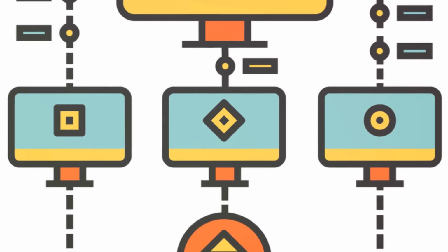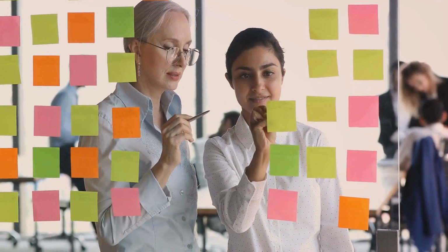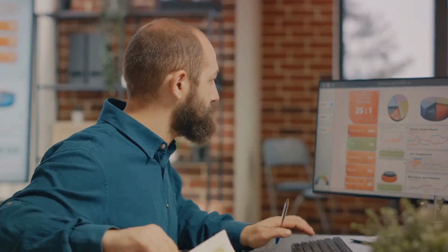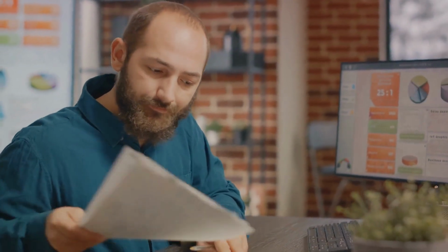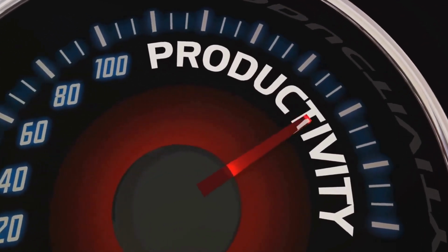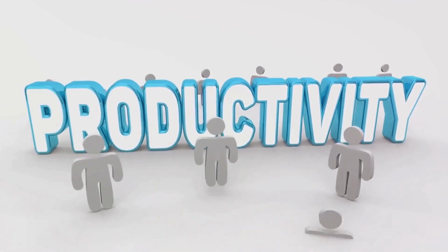Next, we have cycle time. This metric focuses on the active working time, from when a task moves into the in-progress column until it's done. Cycle time offers insights about the team's efficiency. Throughput is another key metric. It measures the number of tasks completed within a specific time frame, indicating the speed of the team's output.